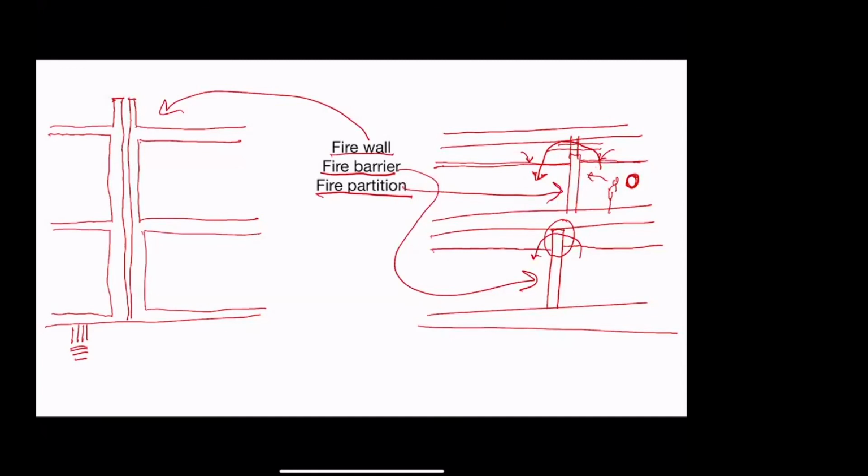That's my understanding. I should add also, I've been meaning to say this for a couple of weeks. A while ago, in one of the 40 minutes of competence, I said something that I no longer believe to be true, having nothing to do with this, but now's a good time to bring it up. I had straight out said that contractors who are covering their ass file a lot of RFIs. In other words, different contractors will make decisions on their own in the field, and if they want to make sure they have a defense in case they go over budget or beyond their schedule, they want a record of RFIs so they can say, look, the architect didn't respond to us quick enough, or the architect didn't put this and that on their drawings.